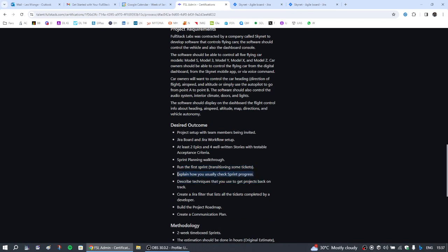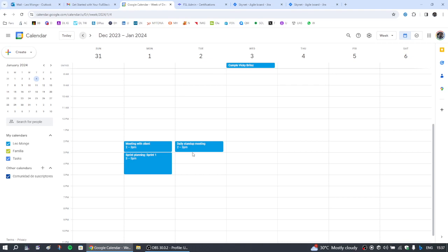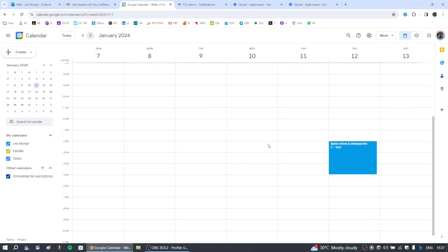So one of the things is sprint progress, which is on dailies, as I said. We define there what we're going to do with each one of the tasks. Of course, we ask the rest of the team if they have some things or problems that could arise. Then what I usually do is on Wednesday we try to have everything complete. If something has too many pieces and needs to fit together, do it all for Wednesday so we can test it on Wednesday or Thursday, and on Thursday fix the bugs.